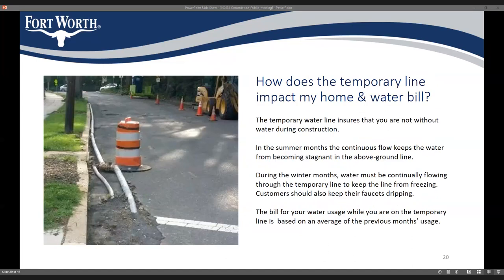To keep water service to your home during construction, we have to run a temporary water line to your house — you can see it in the picture next to the cone, the small pipe running down the street. Note that while you are on temporary water, you will be billed based on an average of previous months' usage, so you won't be directly billed for the water you use during this time.